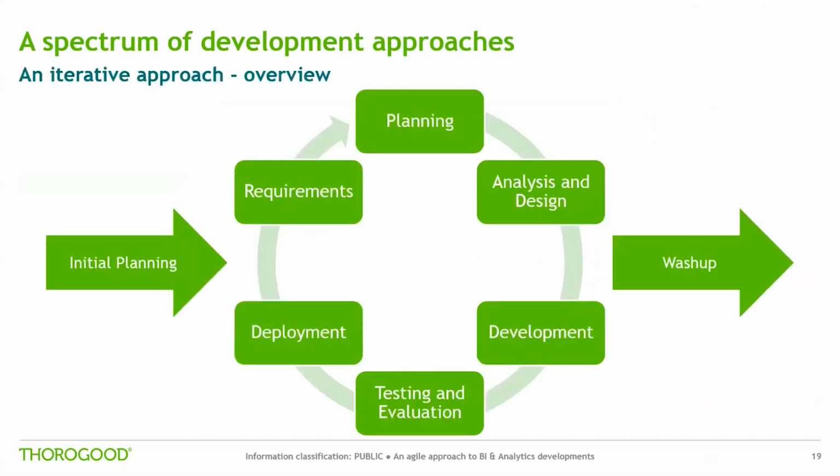Now let's take a look at iterative. Incremental and iterative are terms that are often interchangeable, with the iterative approach differing mostly in terms of the fact that there are no set steps or activities that are required to be undertaken in sequence. Iterative is less formalized, requiring no formal stage sign-off, and has more cycles, but essentially does the same thing, which is repeatedly continue the implementation process until the deliveries seem to be complete.